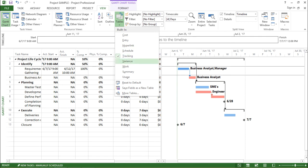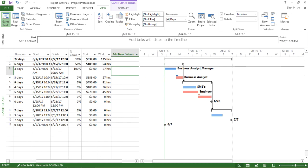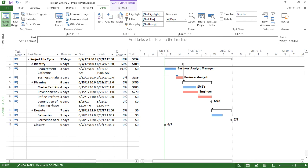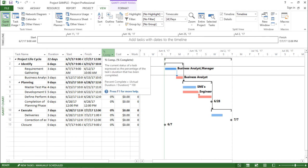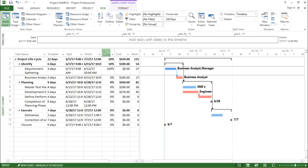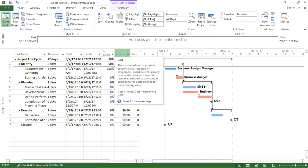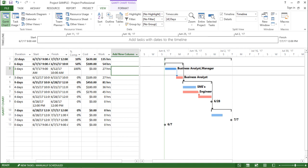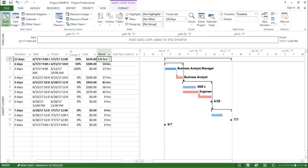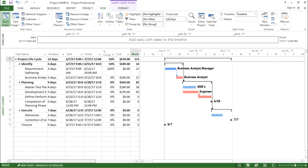So let me skip one or two, and let's try summary. So in this summary feature, it is showing me the overall summary of the project. If you see the duration, duration is there, start column is there, finish column is also there. This time I have the percentage work complete. The cost involved along with this project and I have the work column as well, defining me the work hours.